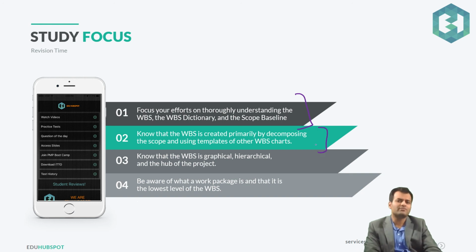That's why we say OPA is an important input here, because you go back to your organizational process assets, take those templates and reuse them for your project so that you can avoid spending time on creating the structure. Of course, the information might be different, but at least it can give you a template and a structure on how to proceed.